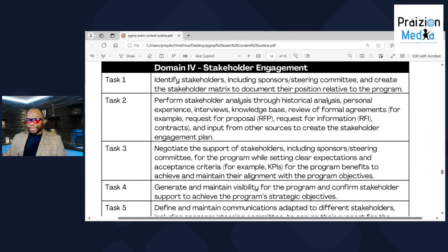All right, my friends, let us get into our final, not the final, almost the final. We're getting there. So this goes into one more after this, and that is the governance aspect. But stakeholder is very easy to understand. So let's take a look at them. Cursory overview. Number one, you got to identify anyone affected by the program, right? Identify the stakeholders. Number two, do a stakeholder analysis. Understand the people who could affect the project. You got to take a look at those who could be affected by the project or who the project could affect.